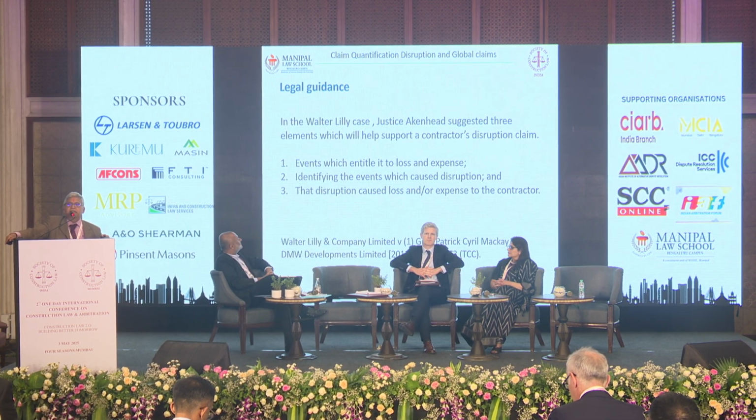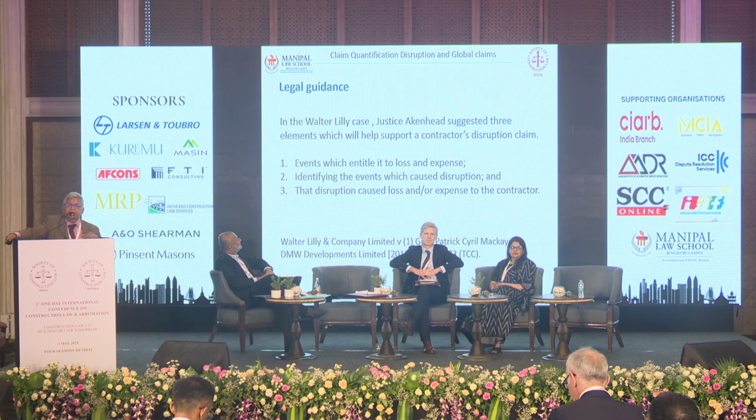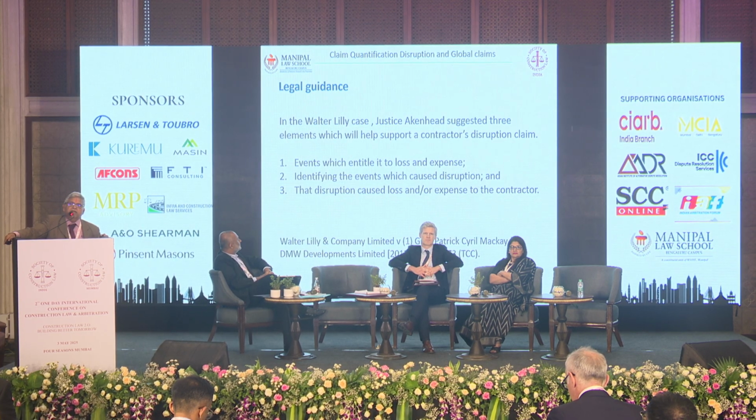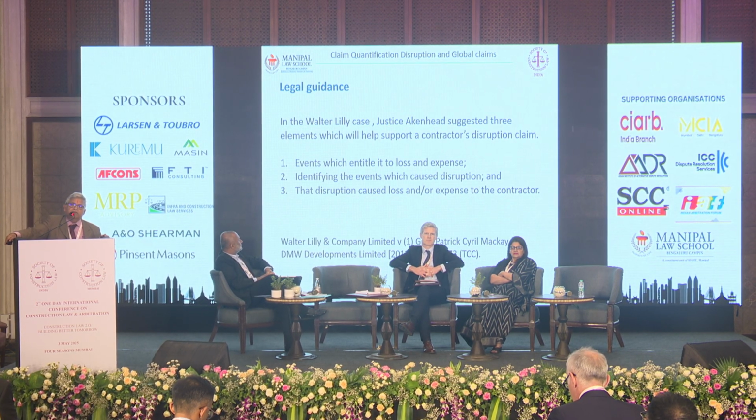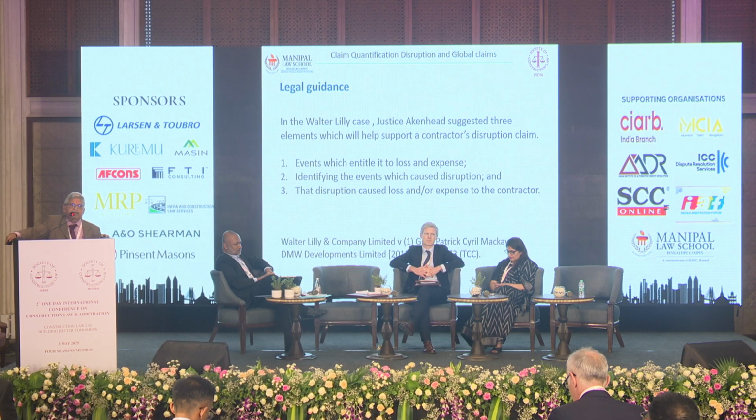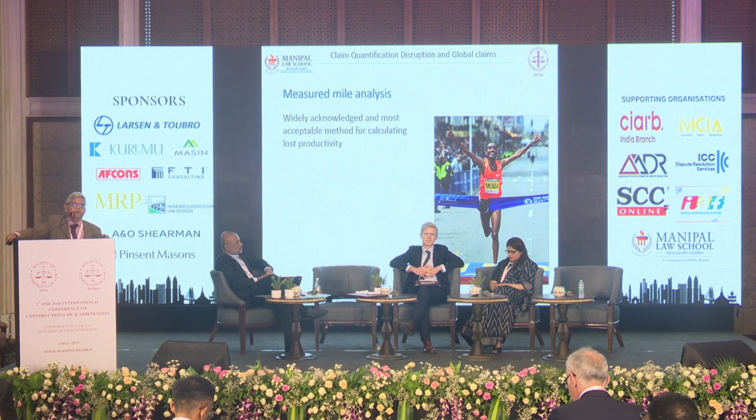So again, the Water Lily, the famous case where anything related to delay and disruption, we can, without thinking, quote that particular case. So there is some legal guidance on that. The contractor has to prove that he was disrupted, that but for that disruption, he would have completed the project on time, and that the employer was responsible for the disruption. These are the three things he needs to prove. Having proved that, he would have a valid disruption claim.